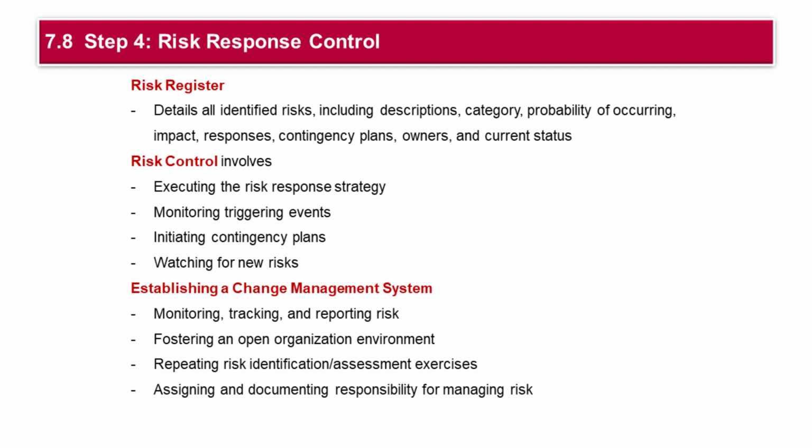Change management is a crucial part of the risk control process, addressing inevitable alterations in project plans from various sources such as customers, owners, or team members. Changes generally fall into 3 categories: scope changes, e.g., new features or redesigns, contingency plan implementations affecting costs and schedules, and improvement suggestions. To manage these changes, a well-defined change review and control process should be established early.